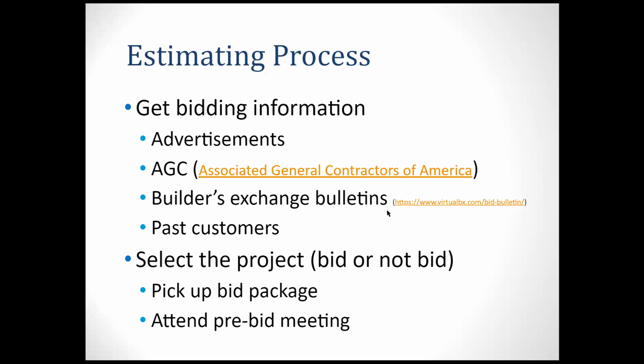Not every project are you going to bid on. Why is that important? For some projects you can bid and you can win, but you cannot earn a lot of money, and you will spend a lot of time preparing the bidding documents, right? So that costs a lot. You need an estimating team, a scheduling team, and a project management team to prepare for this. So normally companies right now have a pre-construction team, right? They focus on bidding.